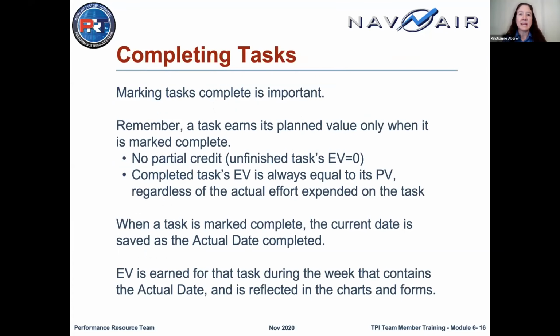All right, completing tasks. I'm bringing this up again because it's important. When you think you're done with a task, mark it complete. Even if you think you might have to touch it again later, there's no partial credit. A task earns its plan value only when it's marked complete. And ideally, you should mark it complete the day you finished it. But if you can't remember, just mark it complete for the week you finished it.